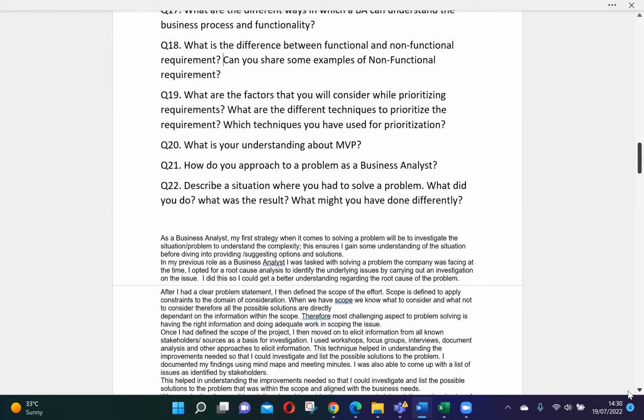You can take the example of a cab booking application. Here the minimum viable product will be the product with features like registration, login, and a screen to search and book a cab. That's all. That is the minimum set of features that you will give to test your product. That's why it is called a minimum viable product. You can give this example.